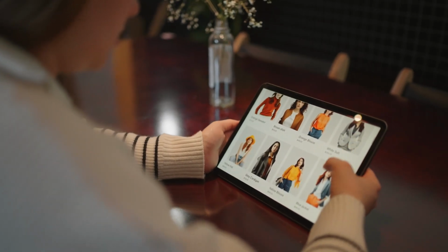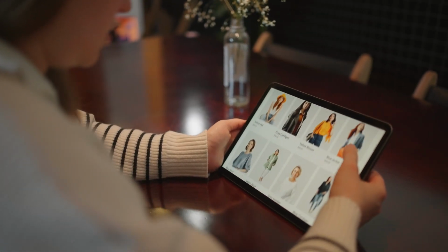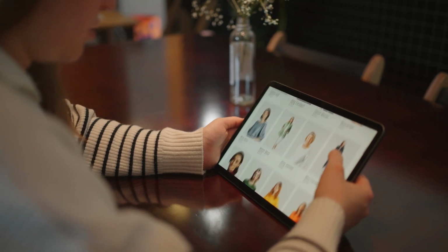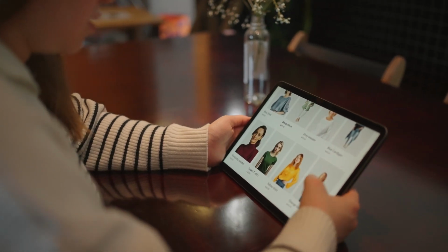And our Sophie decides to redesign the e-commerce website. So Sophie's going to recruit a Scrum Product Owner. And she recruits Oliver, and Oliver is responsible for representing the stakeholders, such as Sophie, and other stakeholders in the company, such as marketing and the sales teams. He becomes the voice of the users to the project development team. This is a short-term project role, and projects have a defined beginning and a defined end.